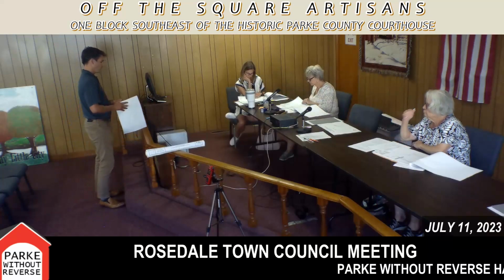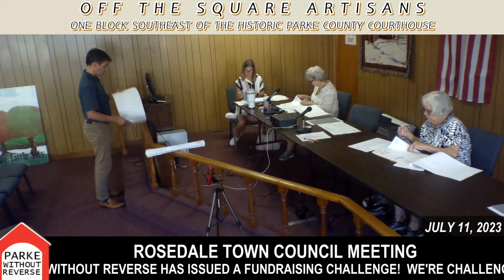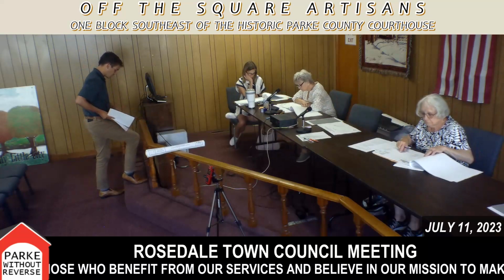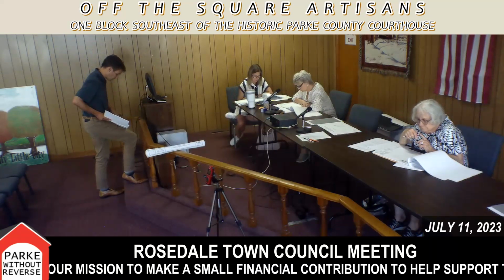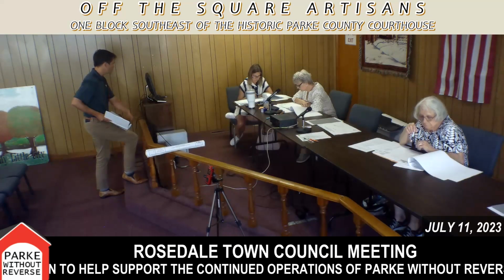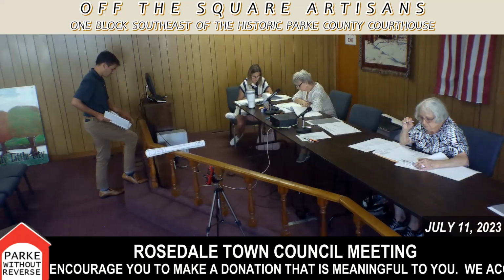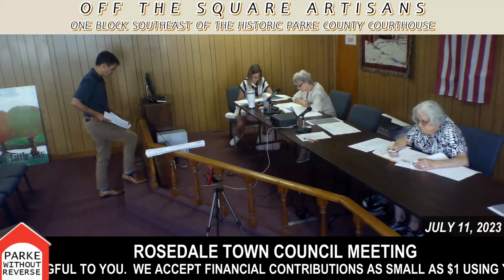Right now, the only place I am questioning that is on PP5. So this is on Central. I went over there before the meeting. You can see that right now we are showing that our storm sewer falls outside the right-of-way. However, we're north of the sanitary sewer, or in other words, we're closer to the street than the sanitary sewer, and we're sitting next to overhead poles. So I'm wondering if we got the distance of the right-of-way correct there, because if you look on the north side, we're not right at the back of walk.